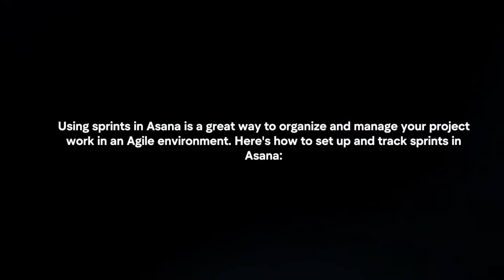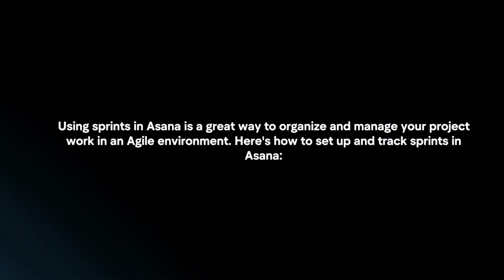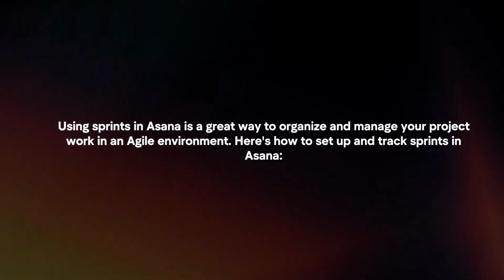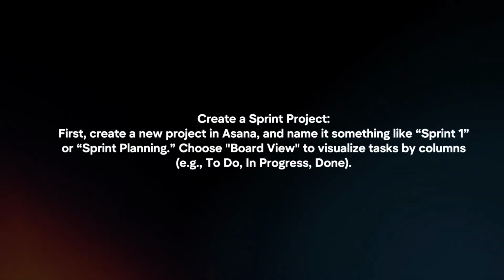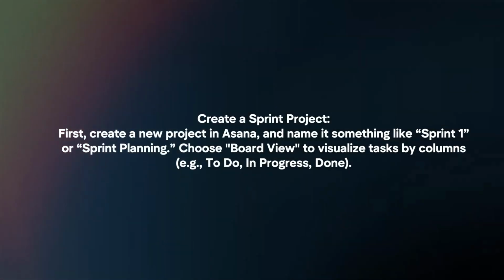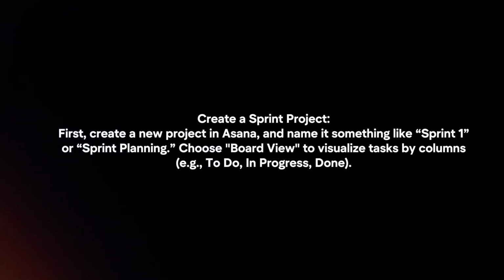Using sprints in Asana is a great way to organize and manage your project work in an agile environment. Here's how to set up and track sprints in Asana. Create a sprint project. First, create a new project in Asana and name it something like Sprint 1 or Sprint Planning. Choose Board View to visualize tasks by columns.